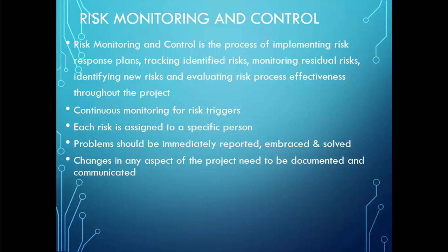Once the project manager selects the proper response, the response will be implemented and risk mitigation will be monitored to make sure that the implementation is correct and no new risk is being identified. The selected response will be evaluated for effectiveness and results will be documented to be used for report generating and as historical data that can be used as a reference for future projects.